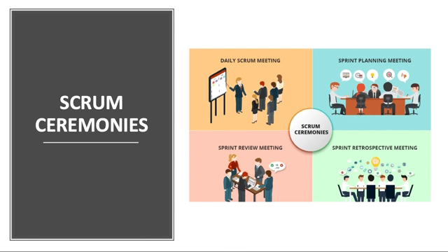This meeting will take a maximum of 15 minutes. This is where the team meets to communicate and understand the status of the project. It is essential because we need to know the continuous project status and avoid blockages on the project. It does not aim to report progress to the Scrum Master, Product Owner, or stakeholders. It simply helps the Scrum team to understand how the project is going within the small sprint term, let's say a 1 week or 2 week sprint term.